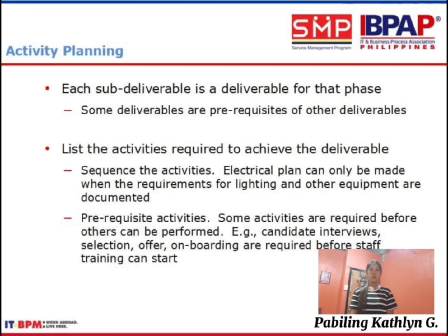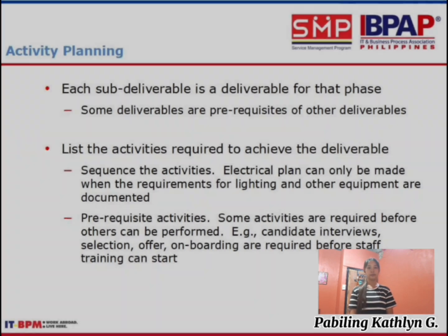Now that we know what we're making, we need to plan the how. Activity planning involves sequencing. Some tasks are prerequisites, meaning you can't start one until another is finished. You can't train your staff until you finish the interviewing and onboarding process.